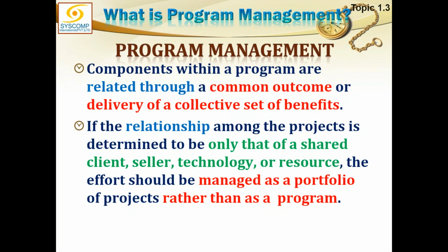If the relationship among the projects is determined to be only that of a shared client, seller, technology, or resource, meaning what? That all of these projects being done under this program relate to a single customer. So where is the relationship? Is the single customer the relationship? That is not a relationship. That is a categorization. And categorization is what a portfolio does. A program is not responsible for categorizing the projects.